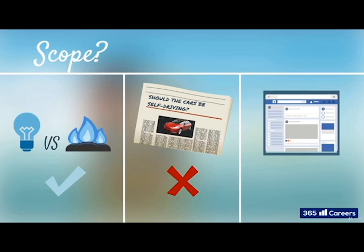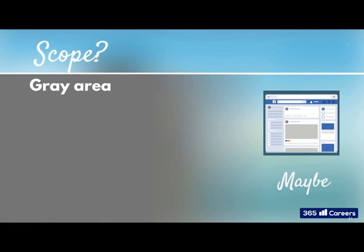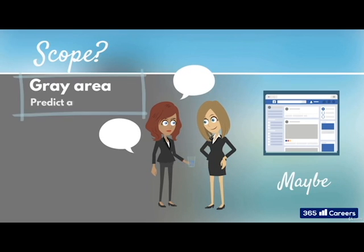When should the showroom's details be updated to the company website? Is this within our scope or somebody else's? It's not always clear where questions may come up and disrupt progress. A so-called grey area, where the team may be unsure whether something is part of the project. So, the sponsor works with the project team and the project manager, if they've been appointed, to try and predict where these grey areas may occur, and confirm any doubts.